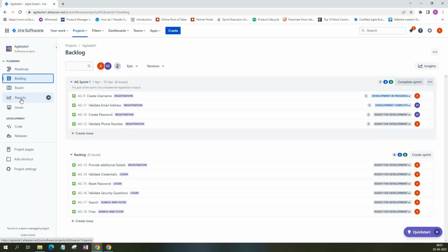So that will be for sprint one. In sprint one, when I complete the query and then test it and save it there, in sprint two, the developer will have a separate story. He or she will create a separate story, or the BA or Scrum Master will assign a story as a follow up of this one separately. It's not like assigning the same one to them. And I will close my story in Rally. More burden, more stories. Here, it's like one item we can track end to end.